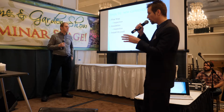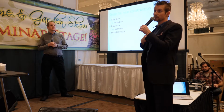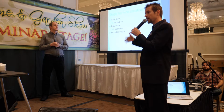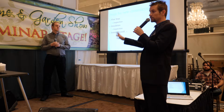It's so important in the city of Chicago to order your inspections early. Again, that's where we see the difference between getting a house built in 6 months and 2 years. If you wait until the work is done to order the inspection, that's an extra 2-3 weeks, an extra 2-3 weeks, an extra 2-3 weeks. It all adds up, and we really keep people's feet to the fire.